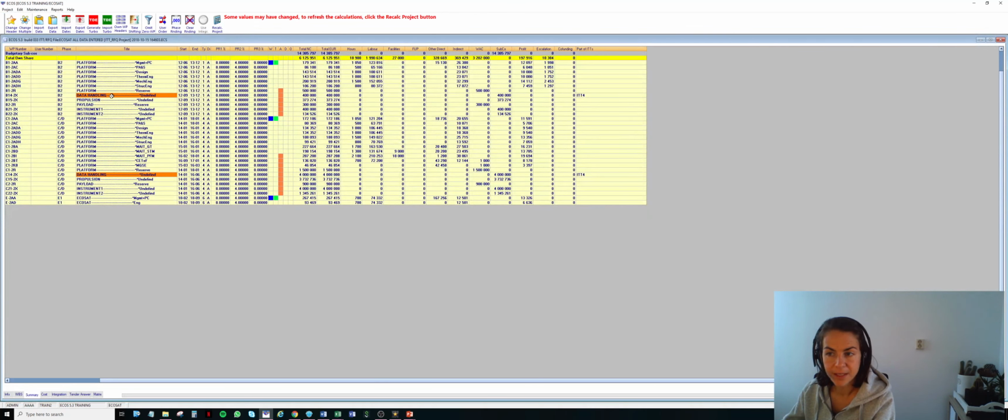Indeed, you see here in orange, the change of color means that there is an overlap identified. So in the case of the data handling, we have both a budgetary subscope provision and an ITT.